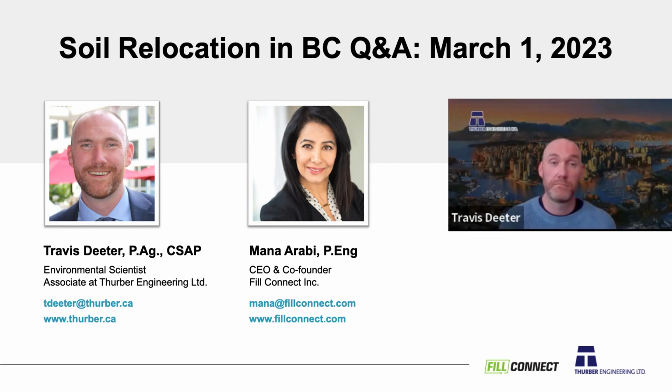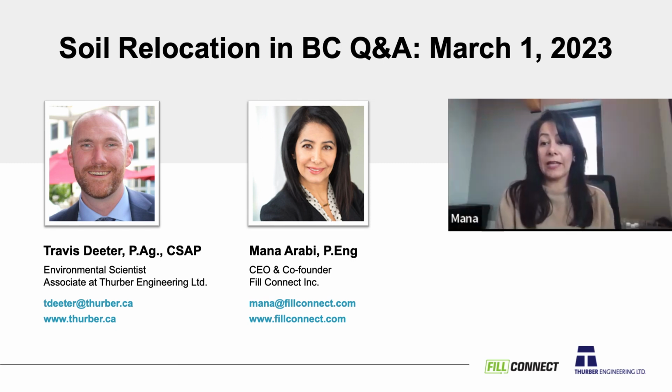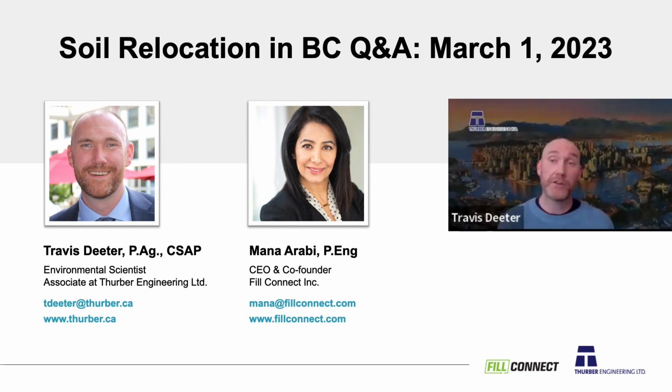Okay. Under Schedule 2 land use, is commercial land included? Examples: shopping malls, office buildings, restaurants, etc. So that really goes back to specific uses on that site. So shopping mall is a great example. Dry cleaners, lots of shopping malls have dry cleaners. Now you've got a Schedule 2 use on your site. That Schedule 2 use is not limited to the footprint of the dry cleaner. It is your entire site.